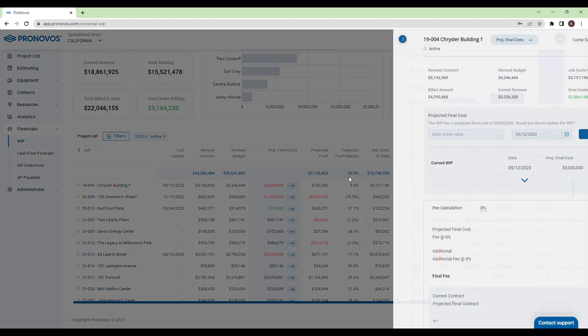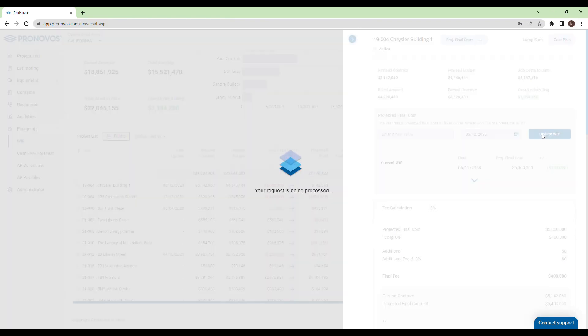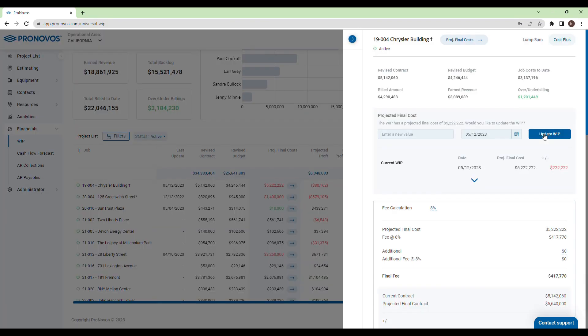Select a project, see more details, and enter the new projected final cost along with the date you want the adjustment to be effective.